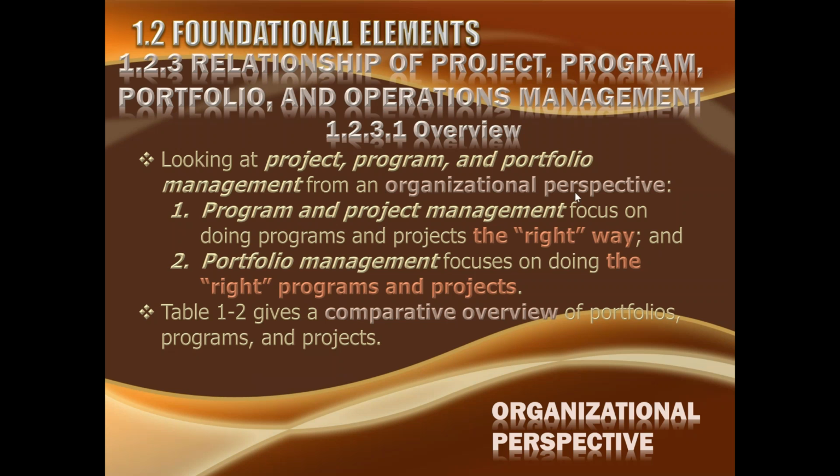Looking at project, program, and portfolio management from an organizational perspective, program and project management focus on doing programs and projects the right way. They're just concerned about themselves. We should do the things right. That's it. Whereas portfolio management focuses on doing the right programs and projects. The selection of which program or which project will be done is actually made by the portfolio management, and naturally it has its own decision making. It all depends upon the funding available to it.